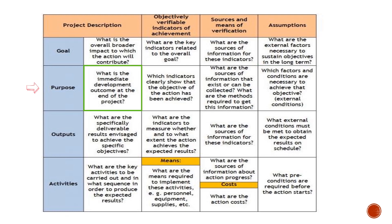Similarly, for purpose or outcome: what is the immediate development outcome at the end of the project? You can show the results in a certain area over a certain period of time. You can see the indicators of the outcome. Sources and means of verification are used to collect that data, and the assumptions reflect the external factors and external risk factors needed to achieve that objective.